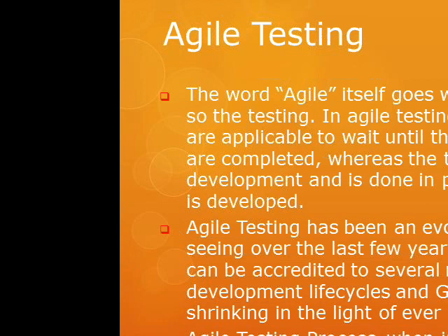The word Agile itself means move quickly. So in testing in Agile, conventional test practices are not applicable, where you wait until the entire development cycle activities are completed. This is a very important point: in this Agile methodology, you don't have to wait for the developers to complete their task and then start your testing activity, just like in the waterfall model. It is necessary that you start as soon as the developers start, as the business requirements arrive. We should start working on test case creation as soon as the developers start working on development.